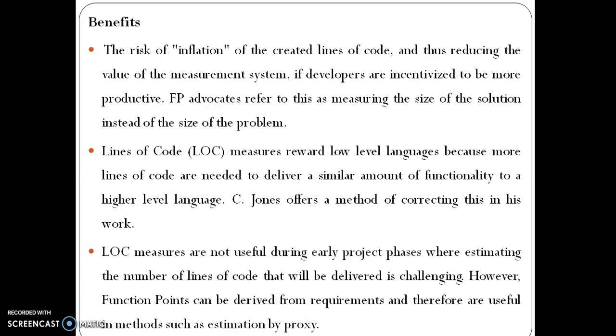LOC measures are not useful during early project phases, where estimating the number of lines of code that will be delivered is challenging. However, function points can be derived from requirements and therefore are useful in methods such as estimation by proxy.